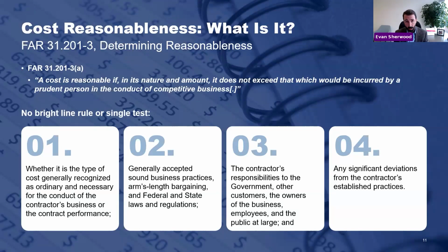So the government's asking, if you have a cost, why is it a legitimate cost of business? What did you do to get a good deal? And why is it my responsibility? And if you take a step back from this, as a policy matter, it makes sense that the government would ask this question. The government has a general concern that in any kind of cost reimbursement situation, a contractor or a subcontractor might say, well, the government's going to pay this, so this is an invoice I got, we'll just turn it over to them. The government wants each person in the chain to look at their costs and decide, are these legitimate costs of doing business? Are these reasonable costs of doing business?